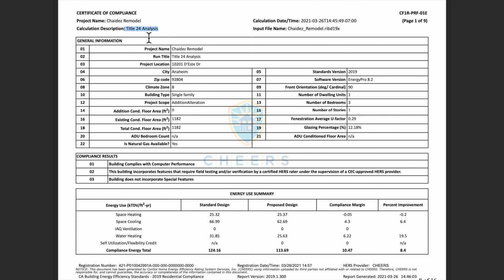So back to the permits, guys. It's always good to ask your municipality what they need, what your plans are, and what permits you all need for that. It might get a little expensive, because each permit may cost anywhere from $50 to $300 just to have them issued.